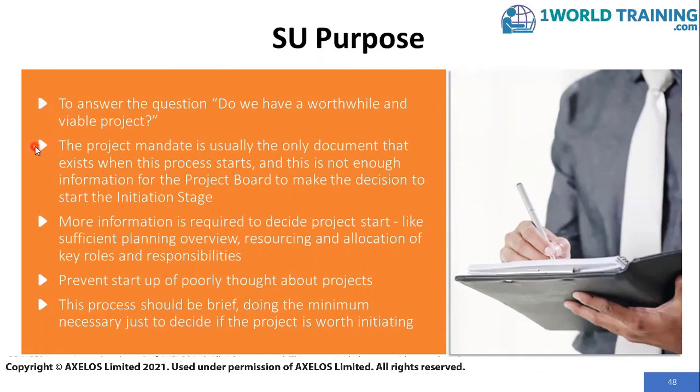The project mandate or the trigger from the corporate level is usually the only document that exists when this process starts. And this is not enough information for the project board to make the decision to start the initiation stage. More information is required to decide the start of the project. For example, sufficient planning overview, resourcing and allocation of key roles and responsibilities.